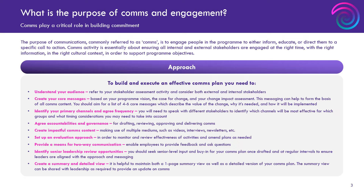Your core messages. I would always advise for any change program to articulate up front four to five really key messages that describe what the change program is, how it's going to be delivered, what the outcomes are, the overall impact, etc. Keep those so that you can keep threading them through different communications. That allows you to be really consistent with your messaging, and it also means that if you've got several people sending out messages, you're all being consistent with how you're articulating the program. You don't want one person calling it something else and talking about different outcomes to something you've written in the latest email. Get those core messages down on paper and give them out to whoever's relevant in the change team or other stakeholders so they can be weaved into all your messaging.